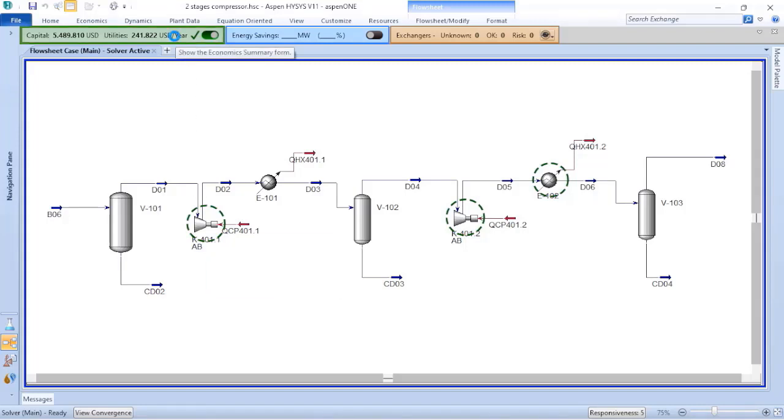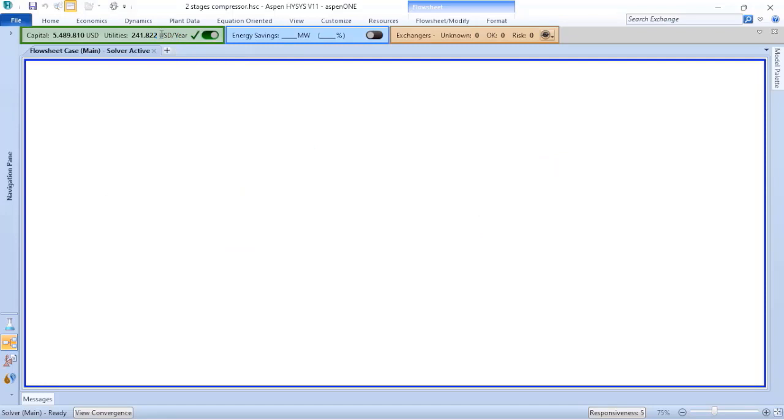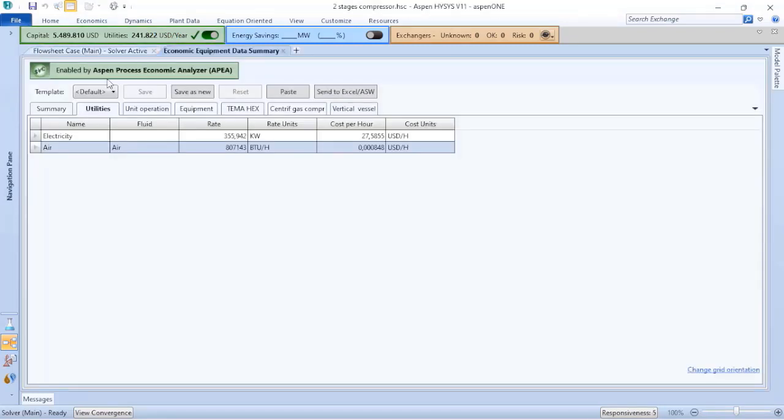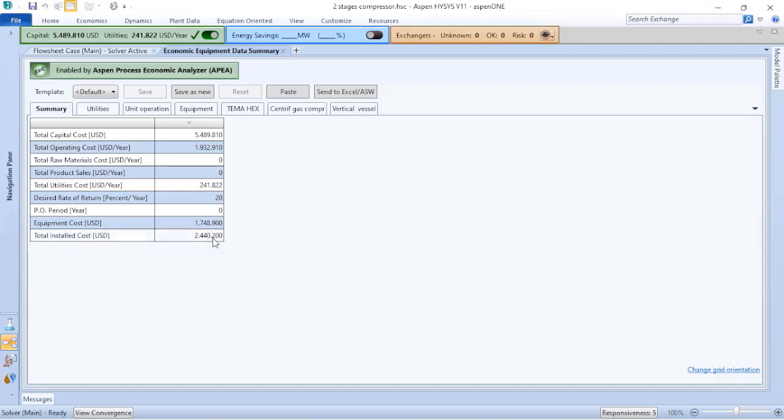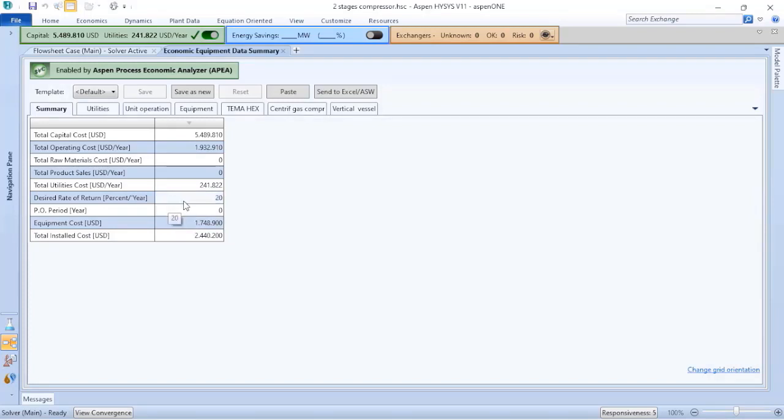When I click on the tab, Aspen Hysys will open what is being considered. Going to the summary, we have information related to total capital cost, total operating cost, total utility cost, desired rate of return percentage per year, equipment cost, and total installation cost. The equipment cost is not the same as total installed cost because we need to consider commissioning, startup, construction, and other costs included in the project.